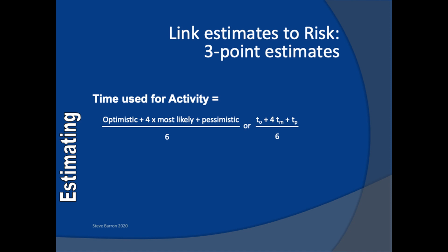If we do not have the means to run a Monte Carlo simulation to draw the distribution curve of the project, there is a straightforward calculation that can be produced on a spreadsheet that provides an approximation. The calculation is the optimistic estimate plus 4 times the most likely estimate plus the pessimistic estimate, all divided by 6. The calculation is performed for each activity, for time and for cost. This gives one set of estimates for each activity that we can use in the project plan.